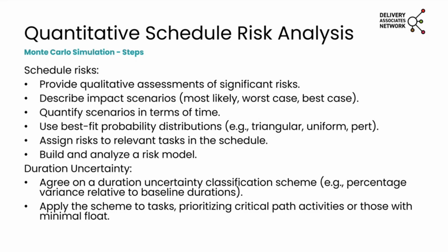You'd get a distribution with a P50 date or a P80 date or all the statistics you can choose, whichever is more relevant to your project. And you can run again a sensitivity analysis and identify your key risk drivers on the end date of the schedule. So very similar again, Monte Carlo simulation.